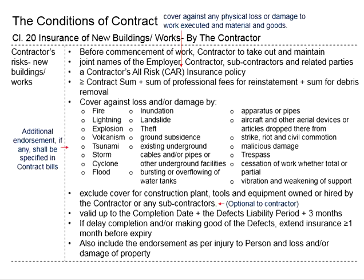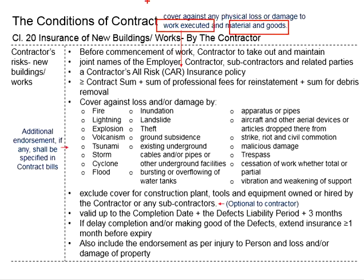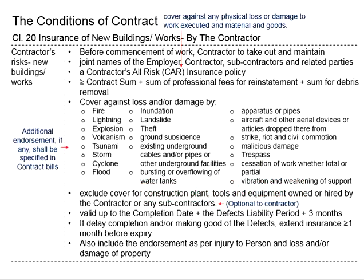The CAR insurance covers up to at least the contract sum to cater for the worst case scenario where the entire project is affected. The coverage typically excludes construction plant, tools, and equipment owned or hired by the contractor or any subcontractor. The main focus is to cover the works, materials, and goods related to the project — this is mandatory and the bare minimum. Coverage for construction plant, tools, and equipment is optional.